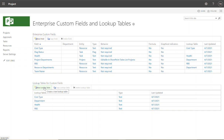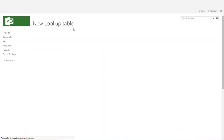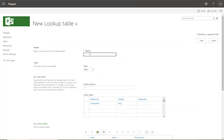The most common type of custom field will be one that contains a lookup table. I'm going to create one that pretty much every project manager will use — a list of different programs. If a project is part of a program or portfolio, you can capture that here. So I'll click New Lookup Table and call it 'Program'.